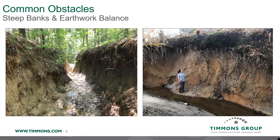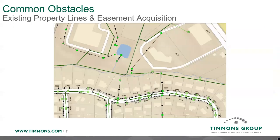Another big thing we deal with on site is finding an earthwork balance between cut and fill. I'm pictured on the right — I'm 5'4", so you can see how tall that bank is and how much cut we're dealing with versus the fill we need to account for in our design. It can get pretty complicated pretty quickly with the earthwork balance. When it comes to an urban site, there are a lot of property lines — one project we worked on spanned 23 different property owners, and we had to get everyone on board with our design and grading into their backyards.